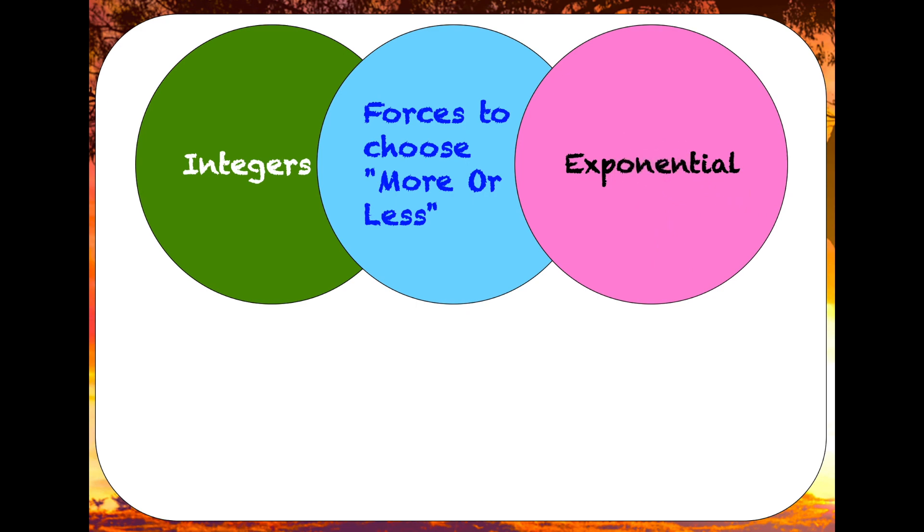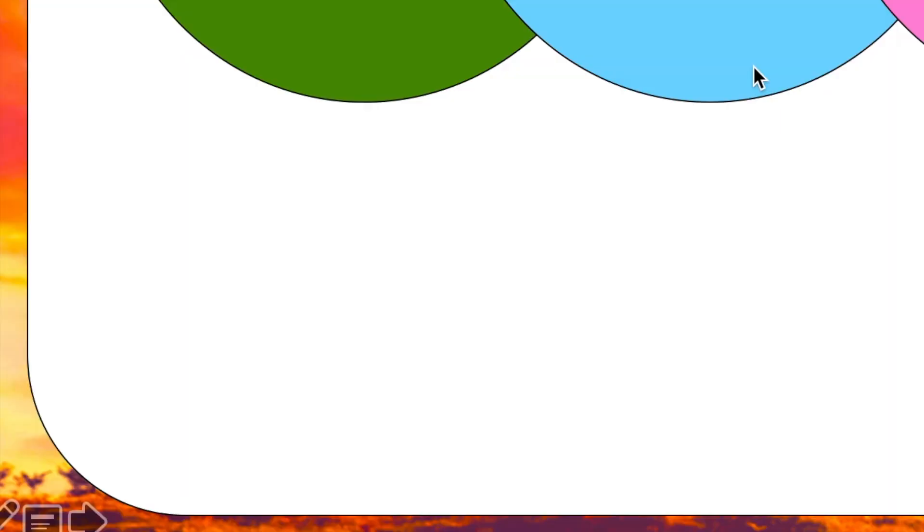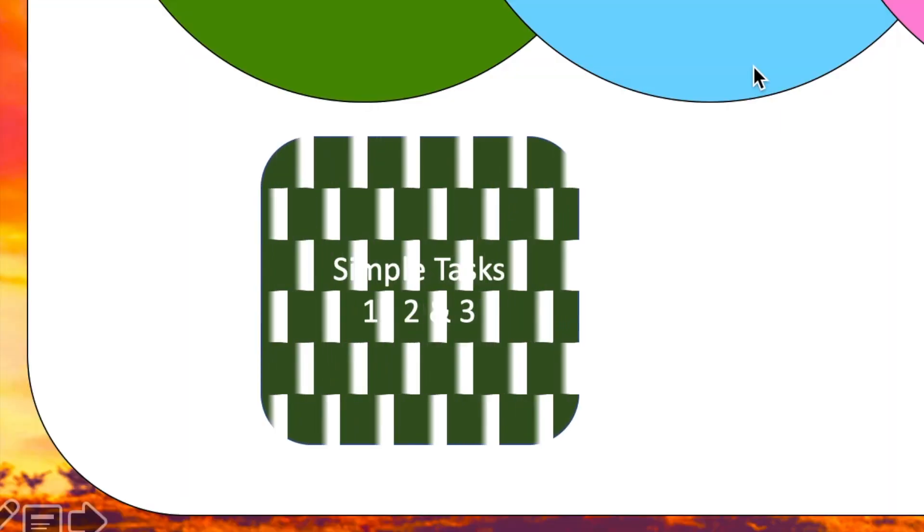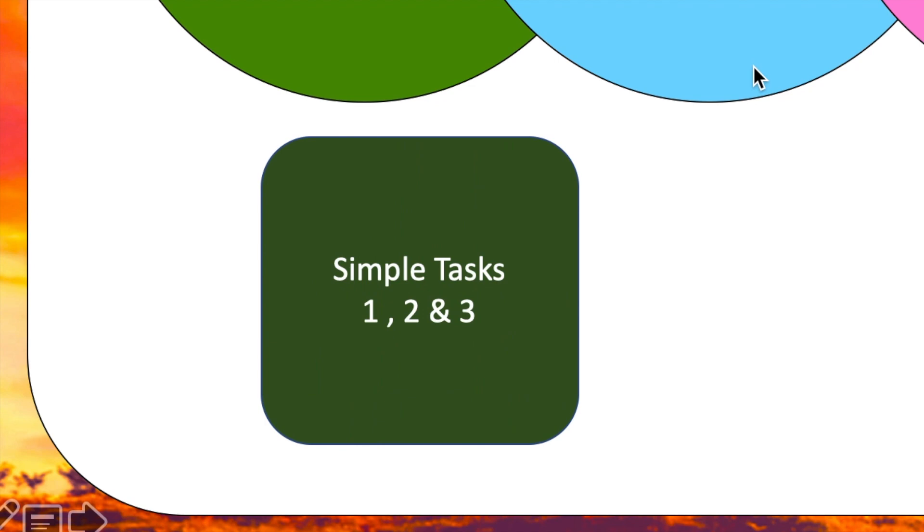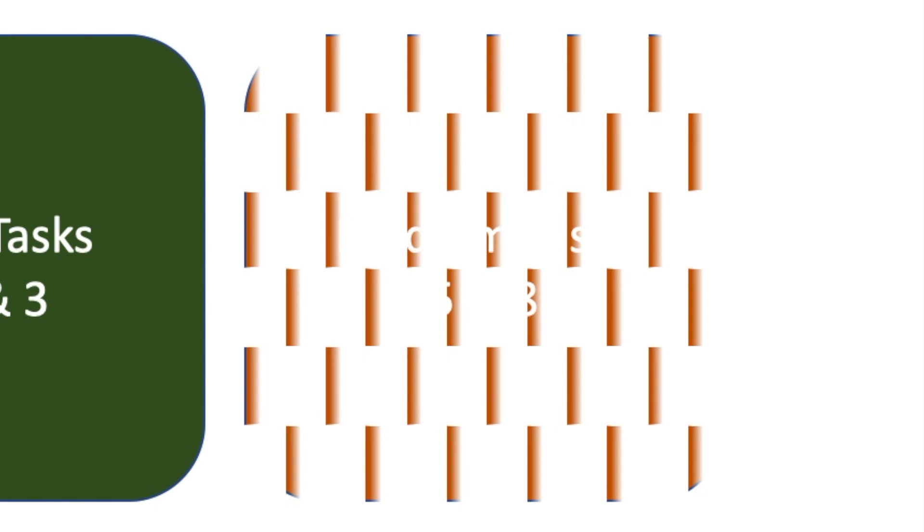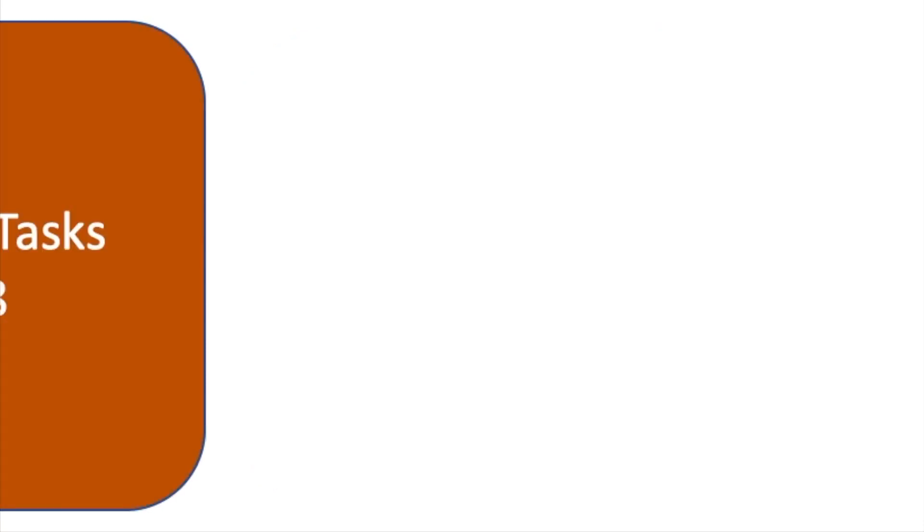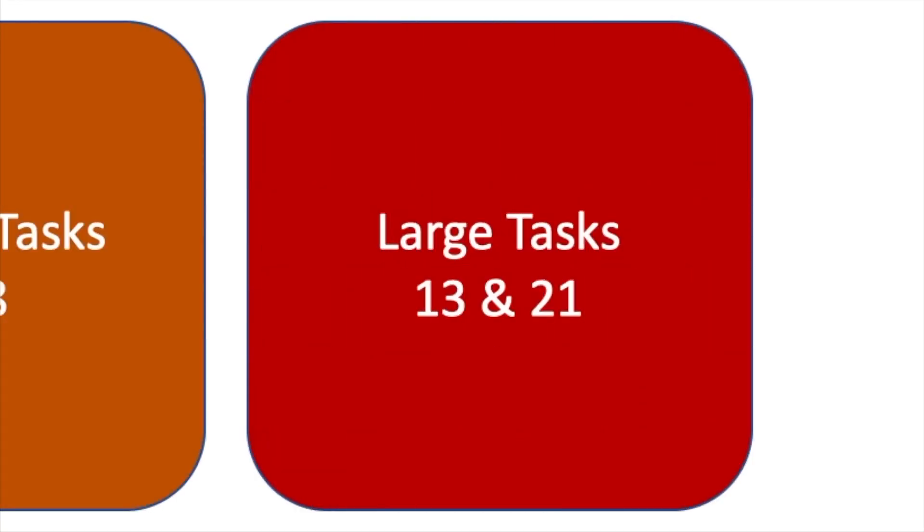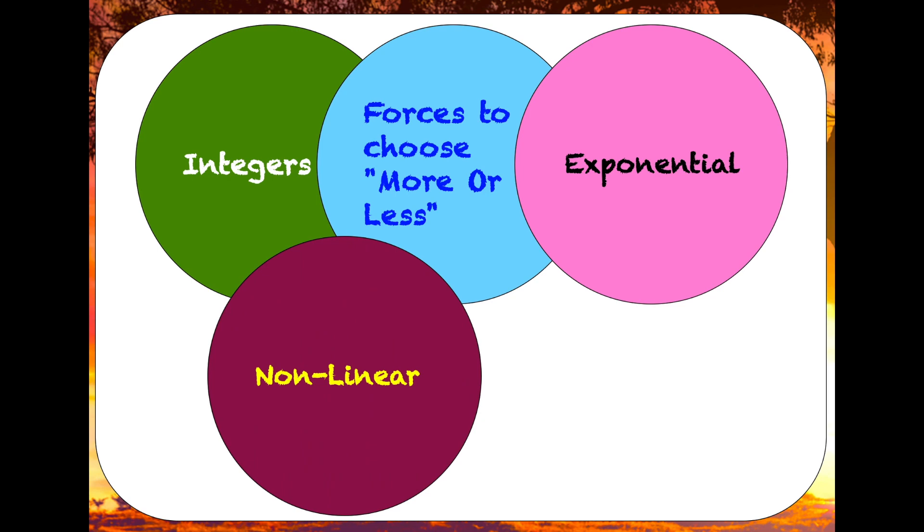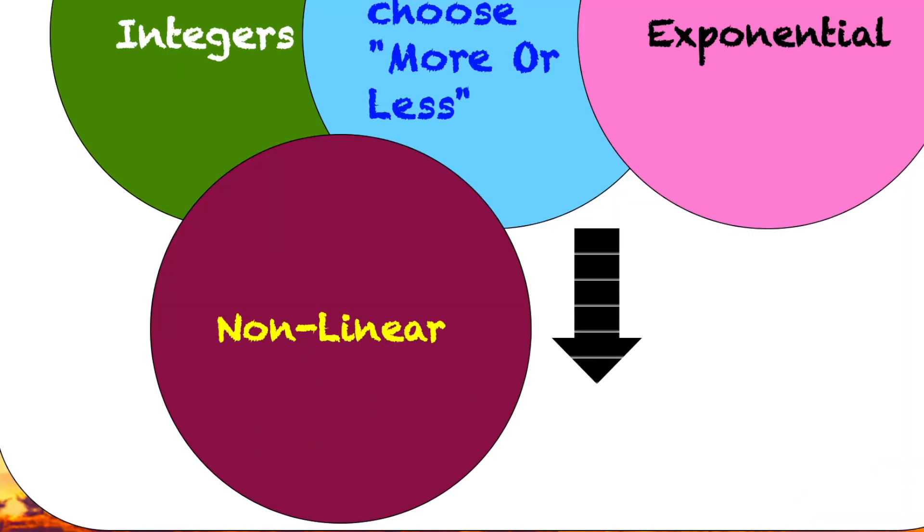It is an exponential sequence, providing detail to smaller tasks like 1 point, 2 point and 3 point stories which are simple to estimate, but starts to provide less detail for the medium level tasks like 5 point or 8 point, even less detail for the large tasks 13 or 21 points. It is a non-linear nature and reduces the over analysis.